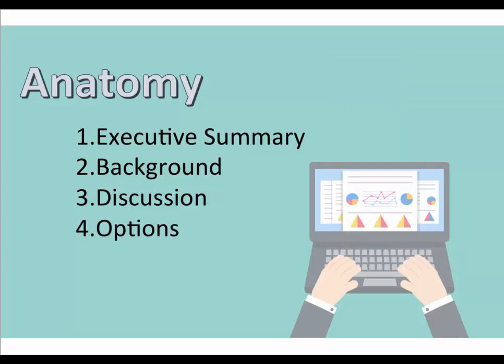Then you're going to explore your options. So really I recommend you have 3 options. If you've just got one option, that's going to be a bit of a problem. The human brain likes to have choice, and the human brain doesn't enjoy ultimatums particularly. So when you give 3 options, your decision makers, your players, feel like they have made the choice. You've put forward a menu of possibilities and they chose one. But when you just give one, then really you're saying it's my way or the highway. It's all or nothing. This is what I want to do, and if I don't get that, I don't want to do it at all.